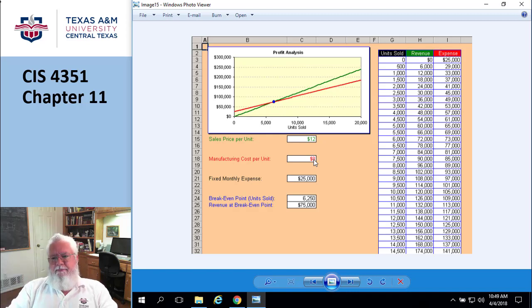Let's say, for example, that I have a mom and pop store, and I have to take cash and credit card receipts, and I put them in a safe in the storefront, and I'm thinking, somebody could break in and cut into my safe or run off with my safe. So one of the things you could do is just don't do that. Take the money to the bank every single day, not even have a safe. So that's risk avoidance. Basically, you make that risk go away by doing something different.